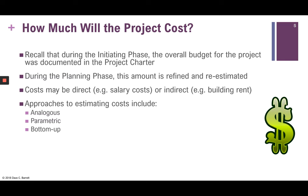The third approach is bottom-up estimating — the most detailed way of estimating. Once you have broken the project down into all its work packages, you determine an estimate for each component. It may involve looking up costs on websites or determining the amount of work for each individual component, then adding it all up into the overall estimate. That's the bottom-up aspect of it. In order to perform bottom-up estimating, it's important to have your work breakdown structure completed or fairly well developed.